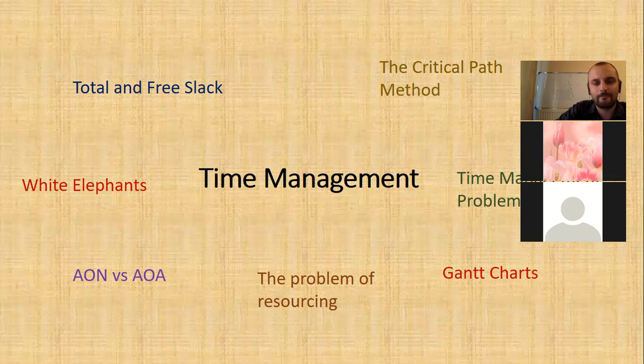Yes, yeah. I am still a little bit concerned and sometimes confusing the total slack and the free slack, but yeah, I'm doing good with this. Yeah. So remember, total slack is how much you can delay that activity without delaying the entire project and delaying the delivery of the project further back. Free slack is how much you can delay an activity without delaying any other activities that come after it.